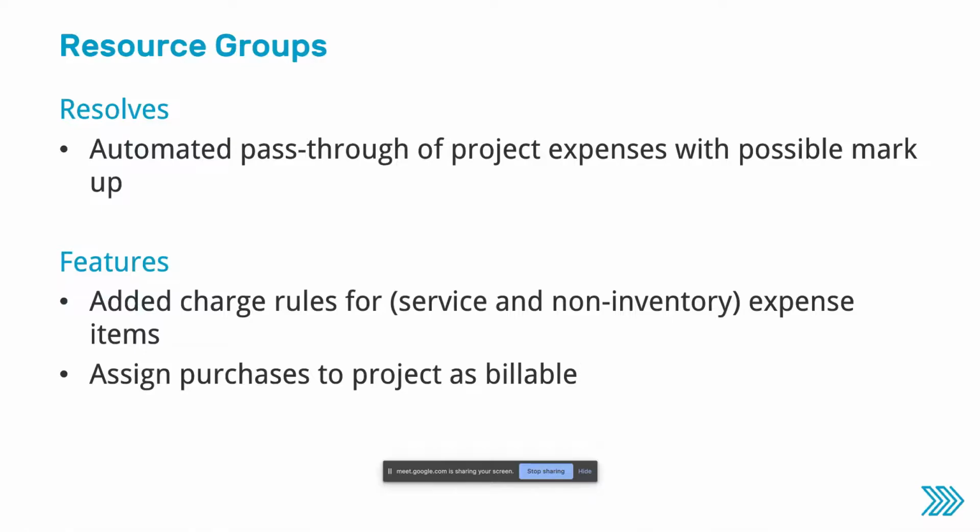I think for a lot of projects, a lot of our customers have pass-through expenses that should be assigned to a project. So you have a bill coming in, and you want to allocate that bill to a project and maybe bill it to the customer. If you use a combination of billing, you would generally use charge-based billing as a billing type on your projects.